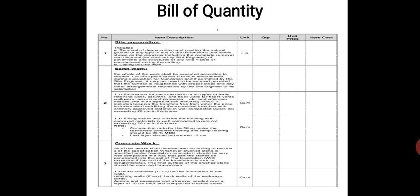Concrete work example: plain concrete at 1:2:4 ratio for the foundation of walls. The unit for concrete work is cubic meter. Measurement is taken from the measurement sheet to the bill of quantity. Quantity multiplied by unit price gives the total cost.